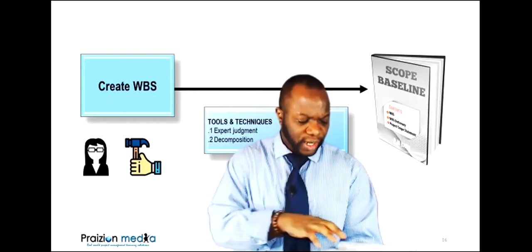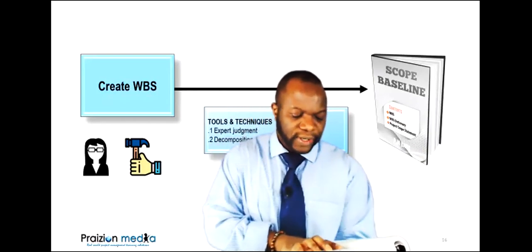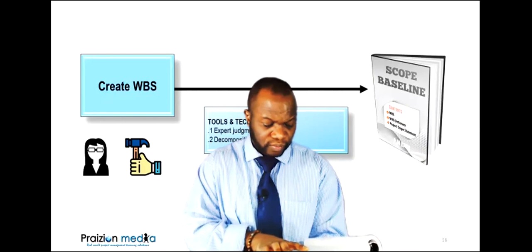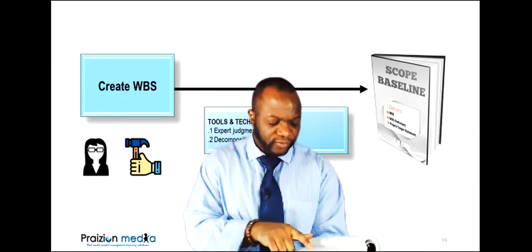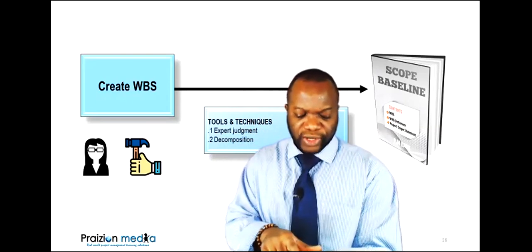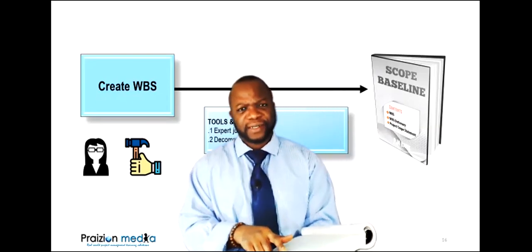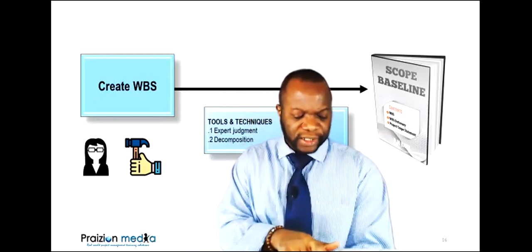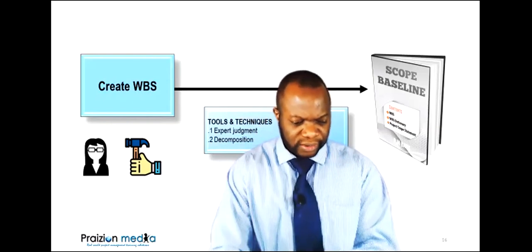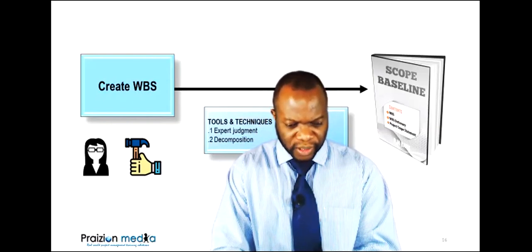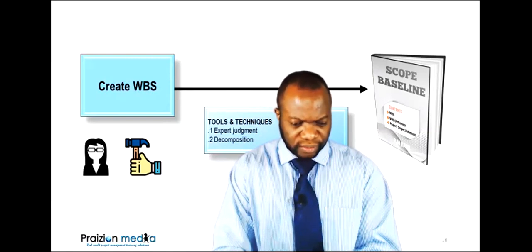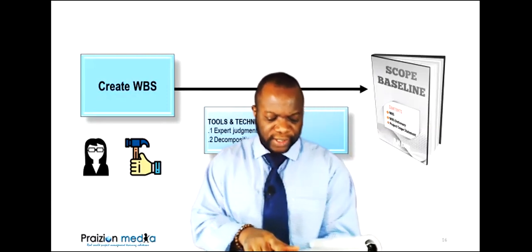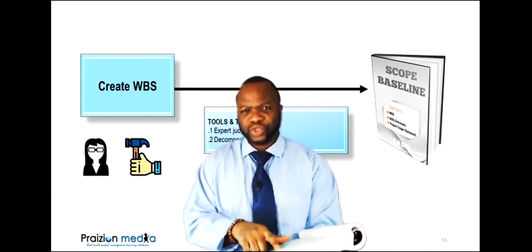But what I want to show you here under work package, let's read. The lowest level of the WBS is a work package with a unique identifier. These identifiers provide a structure for hierarchical summation of cost, schedule, and resource information and form a, please highlight it, code of accounts. Each work package is part of a control account. See that? Is part of a control account. And then it says, a control account is a, highlighted, management control point.